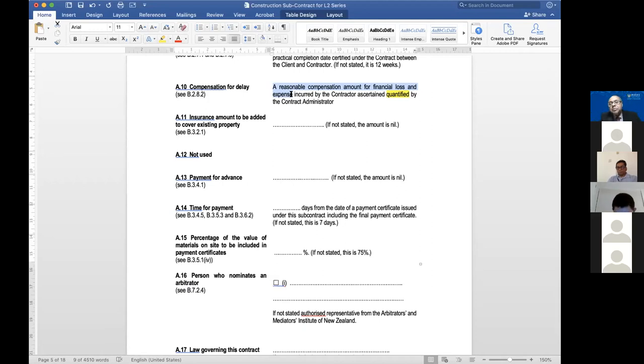If you go and put back-to-back with, say, FIDIC or PAM or JCT, and the architect is supposed to ascertain the amount, and the architect is a contract administrator, the architect will say, hey, wait a minute, I've got nothing to do with this subcontract. It's nothing to do with me. This is a domestic subcontract. It's not a nominated subcontract. It is not a main contract. I've got nothing to do with it. So don't go and willy-nilly start putting in things like, oh, this is back-to-back with the whatever main contract that you're using. Don't do that.